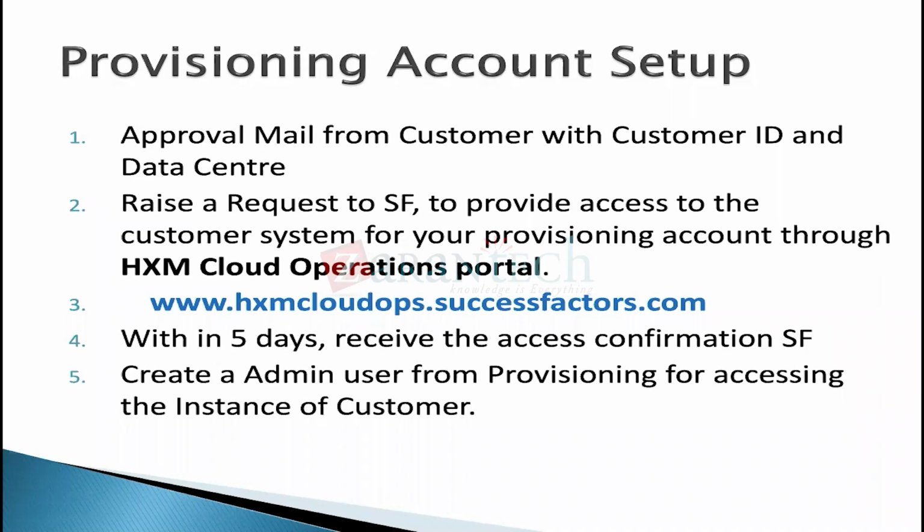With that email, we have to go to this HXM Cloud Operations portal, attach that approval email, and also fill further details in the application form and submit the request. So this is the initial step. Whenever you're allocated to a project, your first focus should be on this. Before you even raise a request, an email is required. It's not that if you ask today, the client will immediately give the approval email. You would need some follow-ups. That might take weekdays, that might take 2 weeks. It depends on the project.